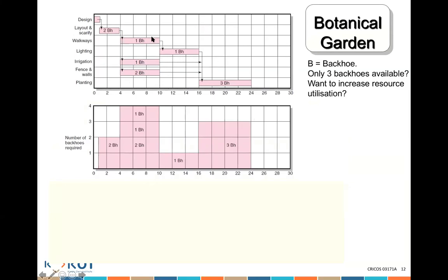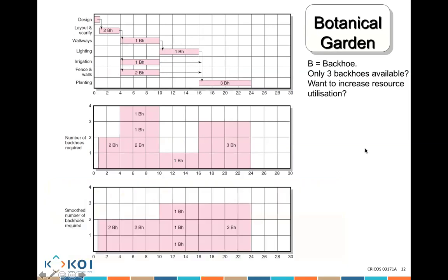We have to do this first, because you see here there's a slack. Look, the slack. There's slack, so I can delay this activity. I can delay this activity. So what we do, we do this one first, then we do this one and this one, which means I will still be using 2 people. But this one here that can be delayed, look at the slack, I'll push this activity here to week 10 to 16, which means I will have 2 people here, 1 person here, that makes it 3, 2 people here, 2 people here, 3 people here, and 3 people here, which is like this.